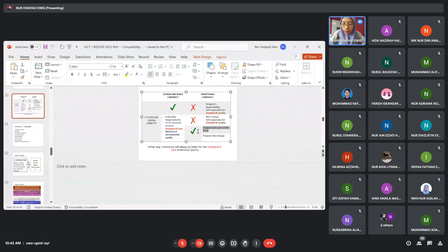If he proposes a totally new design, apart from the architect's design, then he must be liable for his design. So for traditional contract, there's no design liability except if he designs some portion of the work, or proposes a new design, or instructs his nominated subcontractor to design some portion of the building. Then the nominated subcontractor will be held liable. As for design and build contract, you could see